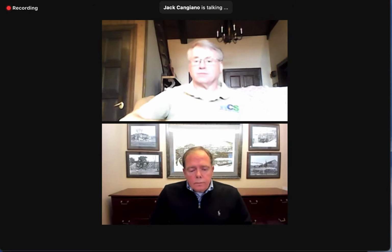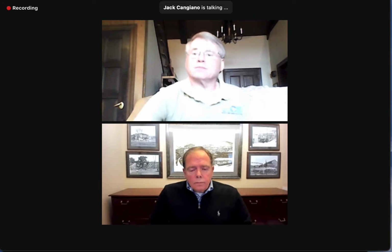Again, as Jack mentioned, a lot of times DEP requires a pilot study, and this is something that we could do concurrently while these things are being reviewed. They bring the skid in, they set it up. Maybe you could address that a little bit, Jack, on that process and how that works. Yeah, so for the whole pilot process, we'd ship the unit out of Wilmington, Mass. We'd get it out to you in a day. It would take another day to set it up, and we could be running on water within a couple of days. So it's very easy to run.